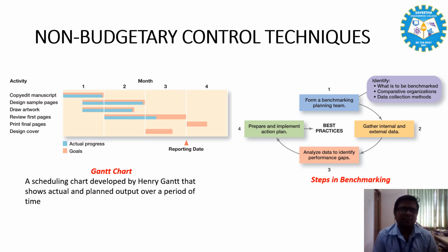All the activities of a Gantt chart show planned workload as constant. In practice, many activities have a front-loaded or back-loaded work plan, so a Gantt chart with percent complete shading may actually miscommunicate the true schedule performance status.